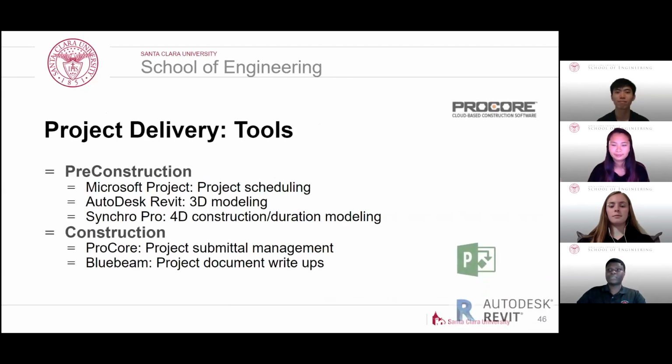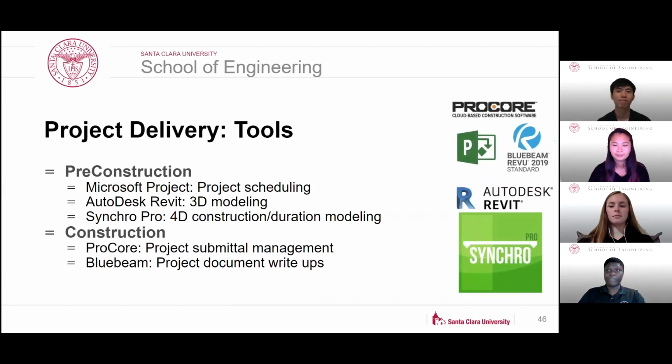To ensure that this project remains on track for design-build delivery, the following programs will be utilized throughout the design and construction phase. During pre-construction, Microsoft Project allows all stakeholders to view expected project progress, provides 3 weeks look-aheads for AOC meetings, and assists in the coordination of MEP subs. Autodesk Revit offers the ability to visualize the entire project on a macro level. Using BIM, it also offers a unique tool to reduce scope clashes among competing trades, often requiring precise specifications for install and maintenance.